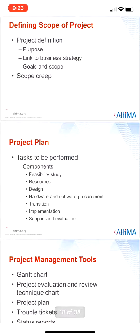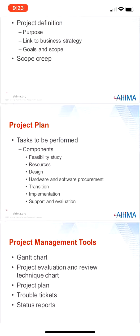Once the healthcare facility knows what it plans to do, the project team can begin dividing the project into specific activities or tasks. The project plan should describe each task to be completed, how it will be completed, who is responsible for its completion, when a task should begin, and when it should be finished. The basic components of a plan are: feasibility study, resources, design, hardware and software procurement, transition, implementation, and support and evaluation. Be sure to read about each one of those on page 49.